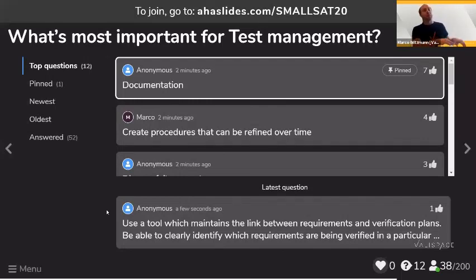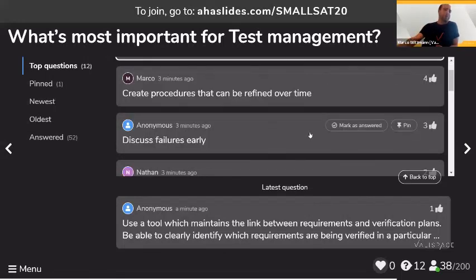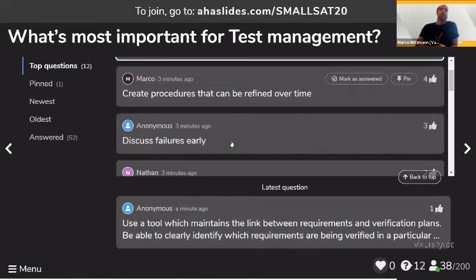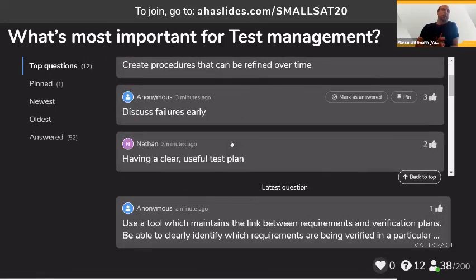And then somebody has to pass them on. I think we are in a digital age which allows you to do many of these things better. Just make sure that it stores the history of what you did, right? Like if you updated the procedure, make sure that you know when it was updated, by whom, which test was still run on the old version, which one was in the new version, right? And I think that's the most important part about documentation. It's not only about writing it down once and putting it into a folder. It's about a traceable writing down.